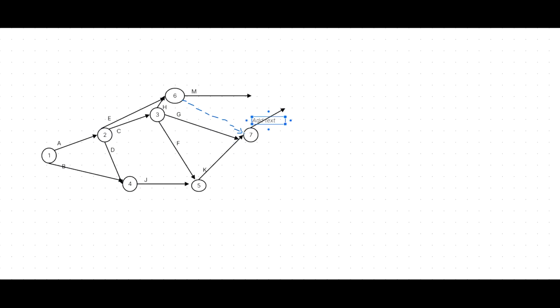Then next, for N, complete L and M. We already have M and L. We need to complete both to start N. Then we can complete, start in 2 different events. We can complete both using another same event, should be the event number 8. We can start N.